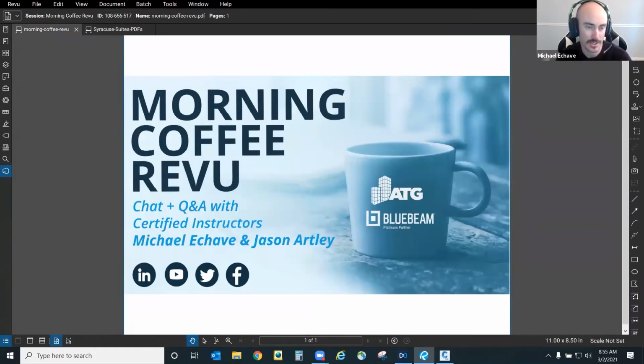So, like Jason was showing earlier, I could have my punch walkthrough on my iPad in a session and start punching items and taking pictures and attaching pictures to them if I wanted to in the session, then come back to my office chair, look at the session right at the desktop, and kind of understand the data that we just put in.